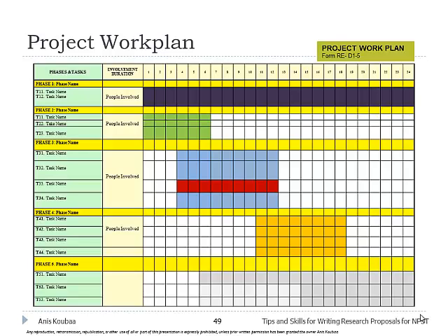Okay, there is kind of flexibility. Sometimes you plan a task, but you may see that another task is more appropriate. So you may drop one task and add another task, but this should be justified, and made with some restrictions. It's not so flexible, because if you deviate too much from your proposal, it's like you evaluate the proposal was not valid. So even if there is a change, it must be minor, and it must be justified.